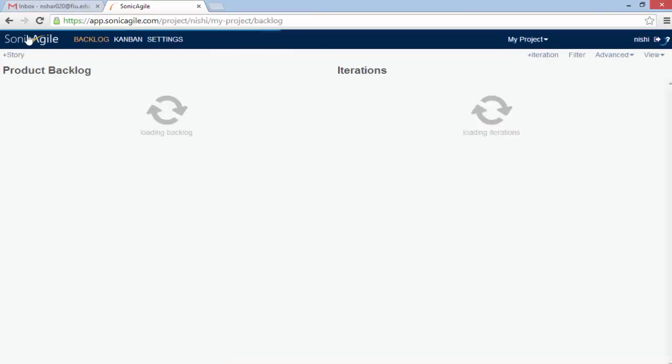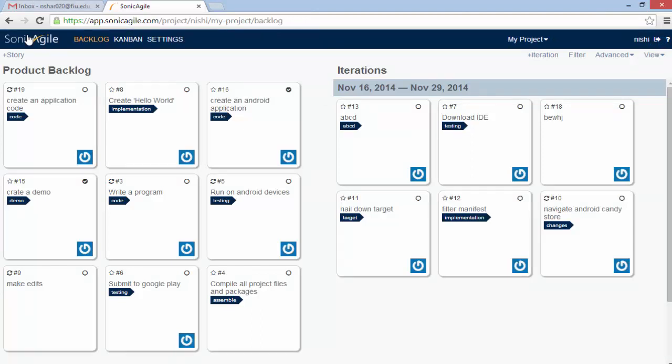So when you come back to your dashboard, you will see a difference. You will see the whole page is divided into two groups. One is product backlog and the other is iteration. So you can group the stories in your backlog into different iterations, that is only sprints.